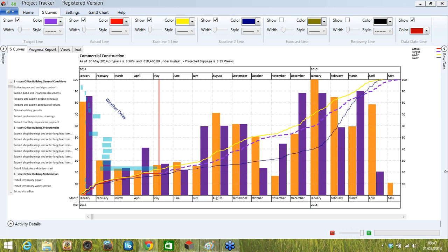So if I've got 10 resources that I want to create S-curves for, I can set up 10 individual views for each of those resources, set them into batch print. It's a one-click, one PDF file, and all of those reports will be in it that I can then send out or print as I need to. So that's the batch print concept. You can still print it as a single just by clicking on print. Away it will go and create the colourful print that you're after, or sending it to PDF, or you can do it through the views, with the ability to one-click multiple S-curves within this one file.